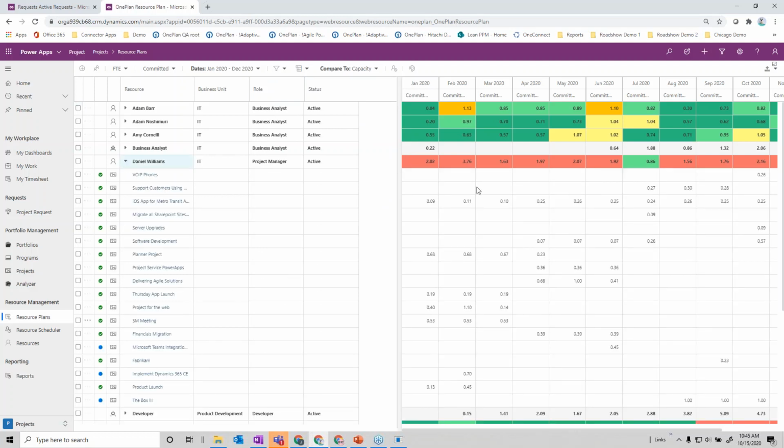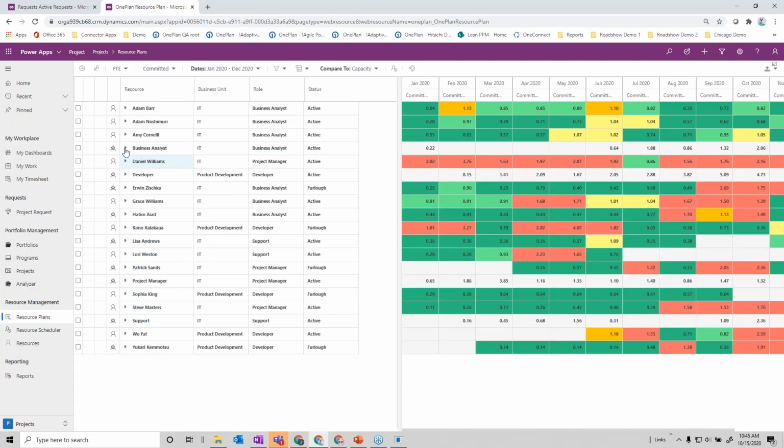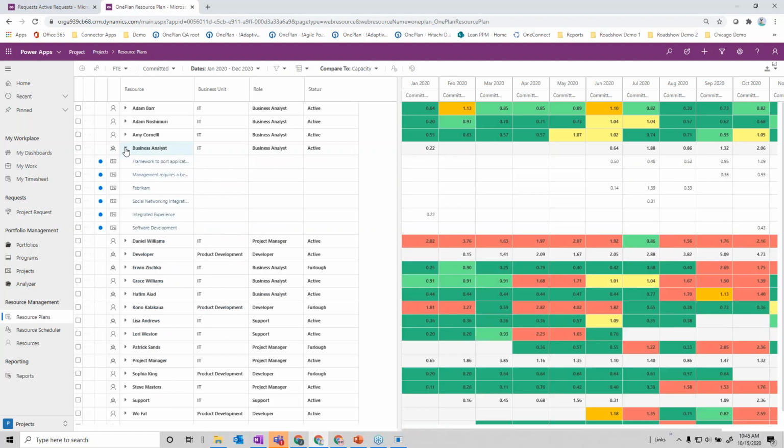and I can see the entire litany of projects that he's on and when he's actually allocated to perform on those projects. And you can see he's spread pretty darn thin. We use Daniel quite a bit in here. But I can also see, for example, where I might still have generic business analysts in. And if I have something in the near term that I have not yet figured out who's going to do that, it's a good alert to me that I should probably figure out a body to put on this rather than leave it in a more generic format.